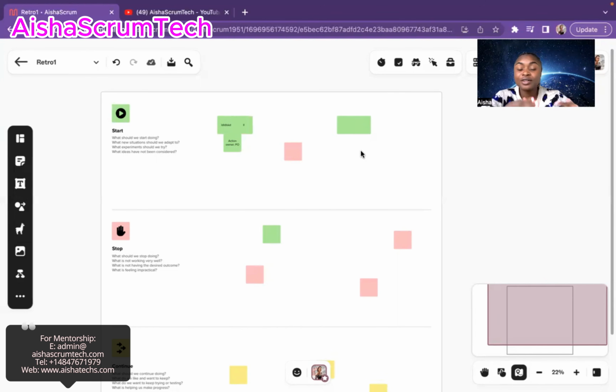By doing that workshop, people maybe can have a better understanding and the purpose of doing it. And then during sprint planning, maybe we can introduce agile planning poker or any planning poker tool, so that we ensure each team member will enter and give their own votes, right? In that case, the action owner will be us, the Scrum Master, because we are the one doing all these improvement items to improve in the next 2 weeks.